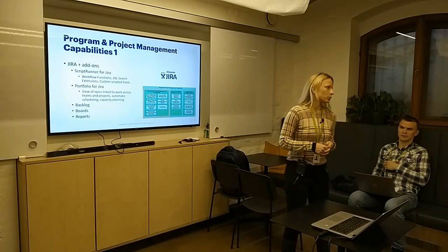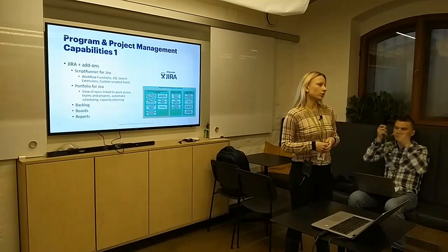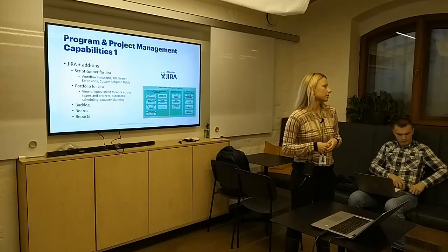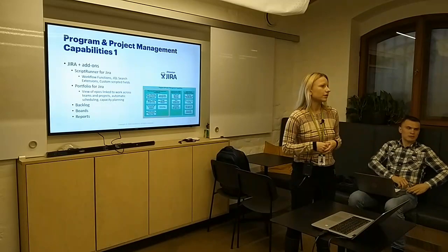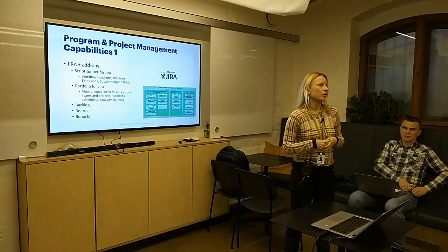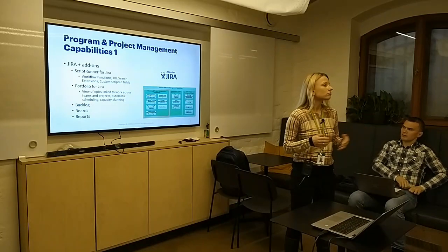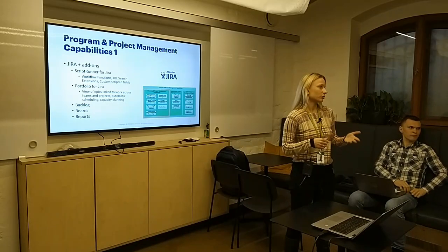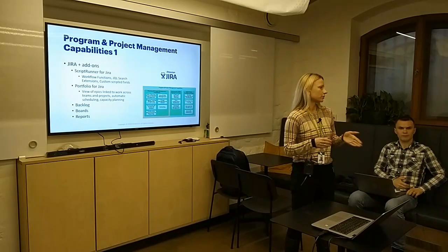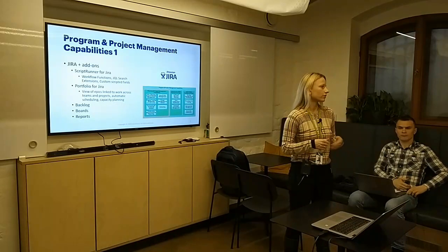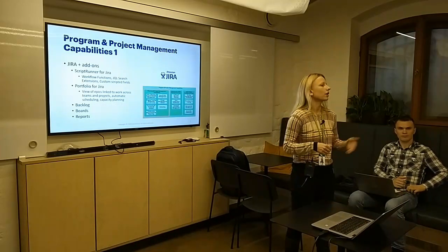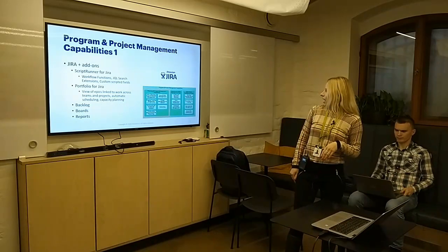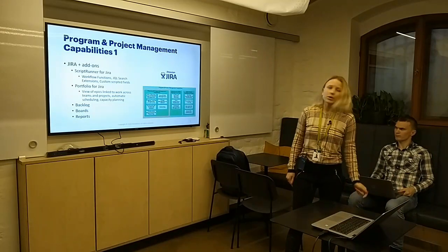Issue and risk management as well. So we have a special board for Scrum Masters. It is a board with the risks, and there are separate types of issues where we can write the risks in our team and then discuss in the Scrum of Scrums meeting how we interact with other teams. So if there are some blockers, or if we are blocking somebody, or some teams block us. And of course, some reporting.